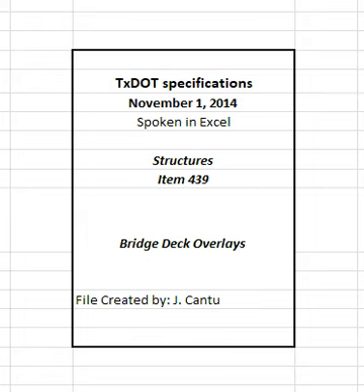5. Construction for multi-layer polymer overlay. 5.1 Contractor submittals. Submit to the engineer the following documentation, and obtain approval before work commences. 5.1.1 Product Data. Submit a list of materials to be used. Provide manufacturer's product data sheets that include material specifications for the proposed polymer overlay system, mechanical, physical, and chemical properties, environmental durability, limitations, maintenance instructions, and general recommendations on storage, mixing, application, cleanup, and disposal of materials.